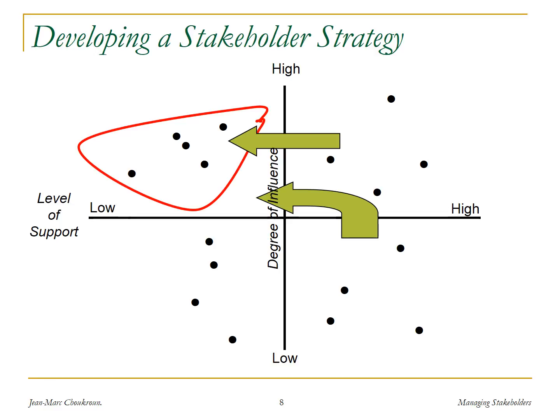But also you can find ways, and that's the crooked arrow, the second arrow, to increase the influence of that bottom right group, to kind of move them somewhere closer to, maybe, the bottom part of the high influence, so that they can also have a little bit of influence on that group on the upper left that is likely to create the most damage to the project.